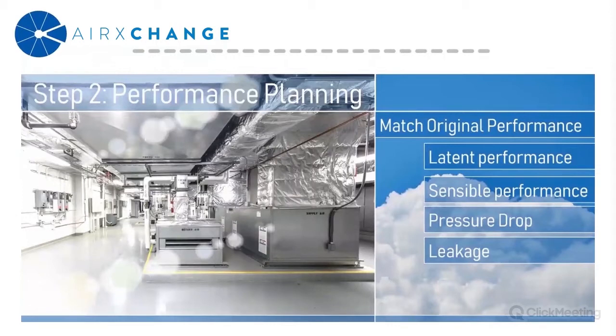So the first thing that you need to keep in mind is that regardless of material, size, orientation, these devices are all trying to accomplish one thing, and that's to condition the air. And since this device is in an existing system, the most important aspect of the replacement project is to start off by trying to match the original performance of the original design. And you want to do this so that the system can operate as it was initially intended. So this would include the sensible performance, the latent performance, pressure drop, and leakages that are associated with the device.